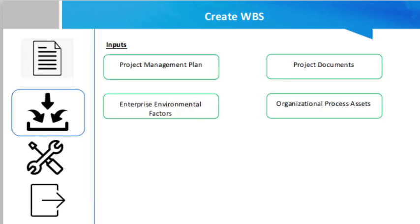The inputs for this process start with the project management plan, which is one of the major components of project management. The scope management plan specifies how to create the WBS from the detailed project scope statement, focusing on how the project scope is defined, developed, monitored, controlled, and verified. Based on these features, the WBS will be monitored, maintained, and approved.